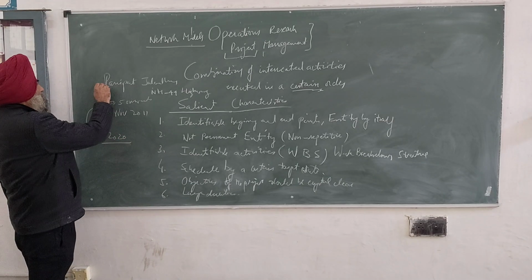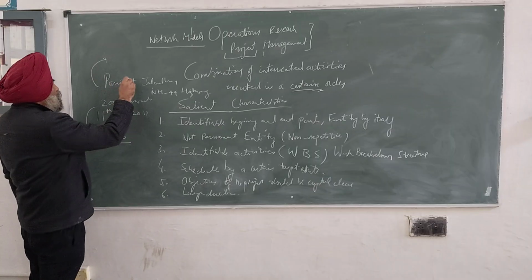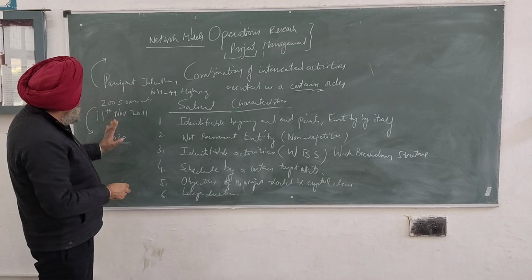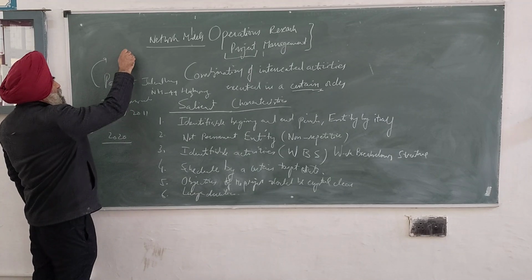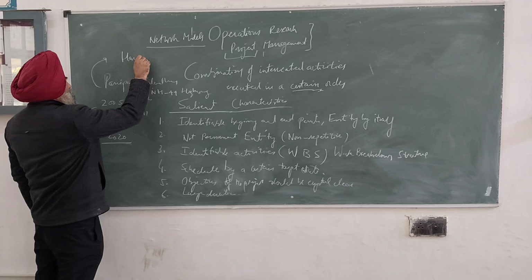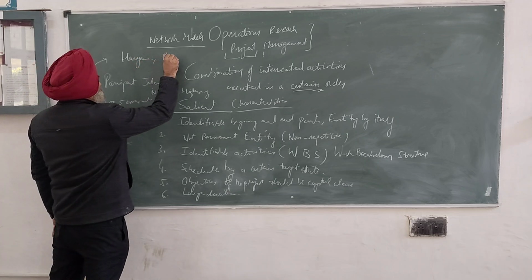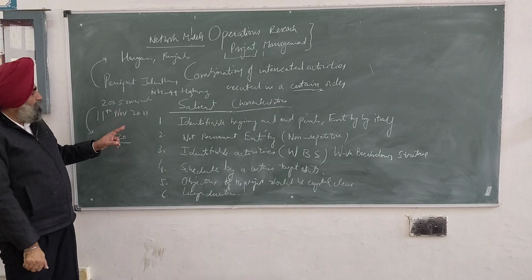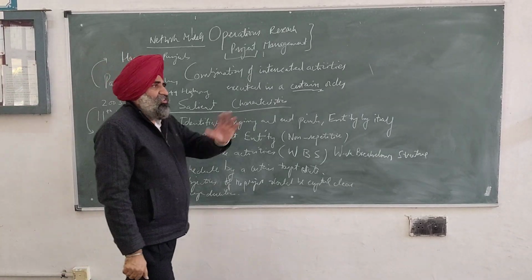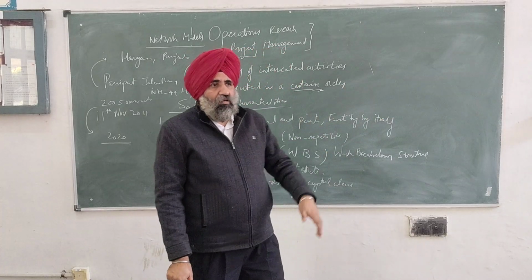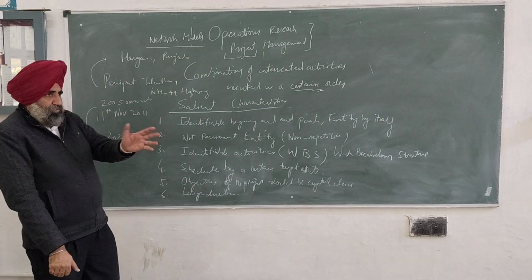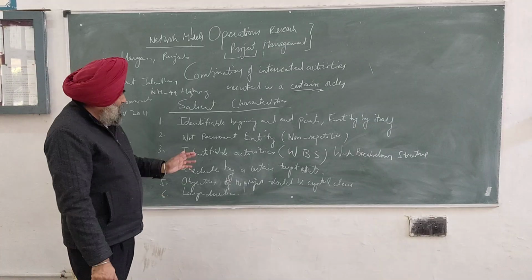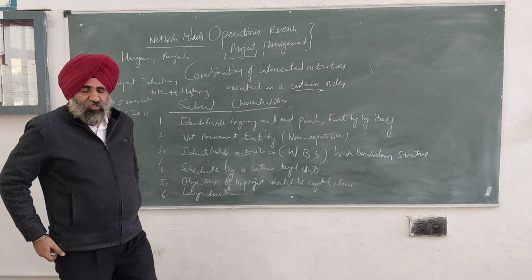There are two state governments involved. This is a central government project. Here there are two governments involved, one is Haryana, another is Punjab. And both the governments have to clear the passage of whatever hurdles there are, especially the electricity poles, maybe the high tension wire crossing the passage, or the forest area that has to be cleared, or the raw material which has to be provided.